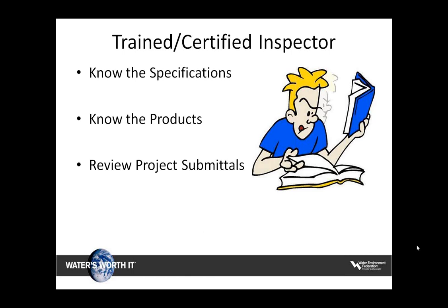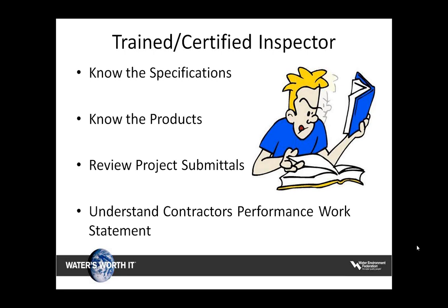The inspector should review all required submittals — information that will be referenced as the contractor does the job. The inspector should also be familiar with the contractor's performance work statement, which contains information about how the contractor is going about getting the job done: installation procedures, safety items, and a detailed work schedule.